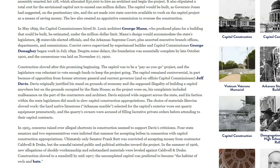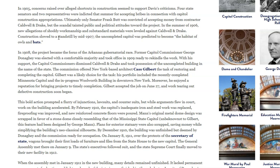I'd also like to point out a timeline issue: George Mann was hired as architect in May of 1899, and work on the building began July 1899 — so we're to believe the architectural work had been completed in that time and they were good to go for the build. The foundation was complete by the following year. This same site gets into the pace of the project and how it basically came to a standstill — shoddy workmanship, substandard materials were apparently being employed.